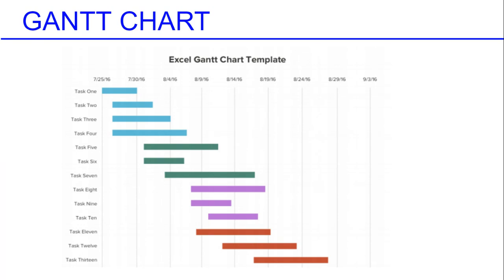So you have task 3, 4, 5, and 6 starting roughly on the 1st of August through the 4th of August, you'll have all those tasks going on simultaneously again. And so this is a real big planning tool that allows you to look at what tasks are happening when, and then you can allocate resources to those tasks, and you can also allocate the personnel required for those tasks, which becomes a huge deal in project planning.